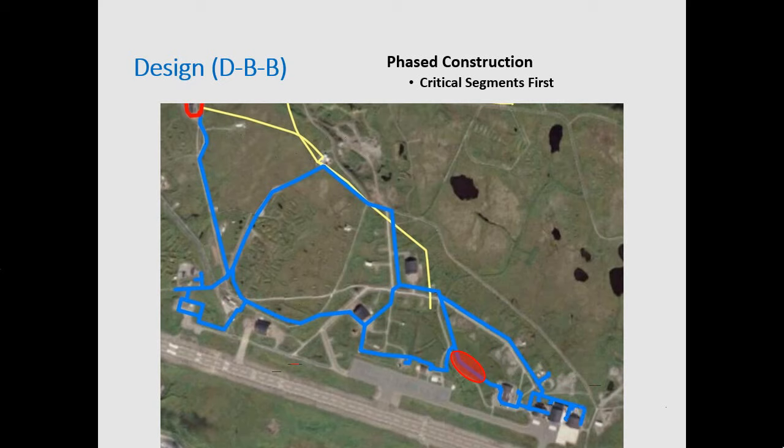So we told the contractor, "Mr. Contractor, when you bid this, fix this segment first. It's not an exact representation, but get this looped up so that they have water feeding from both sides." Good idea, right? What goes along here may need some fire protection down here. So let's get the hydrants up and running. First and foremost, let's get going on this.